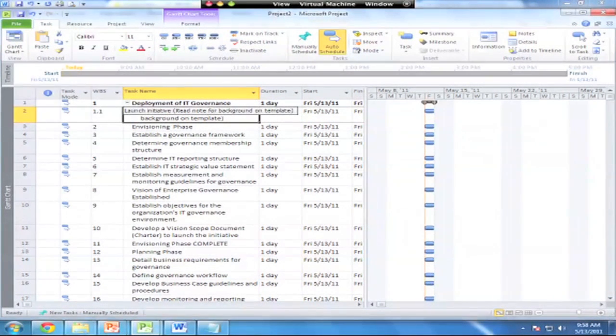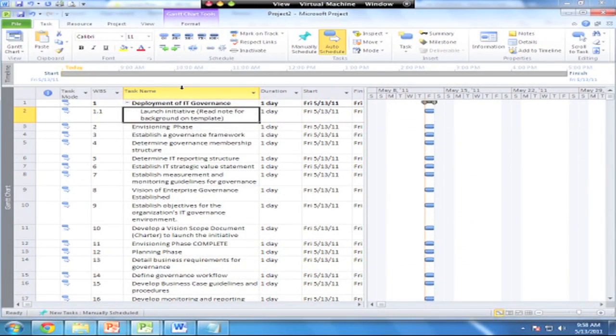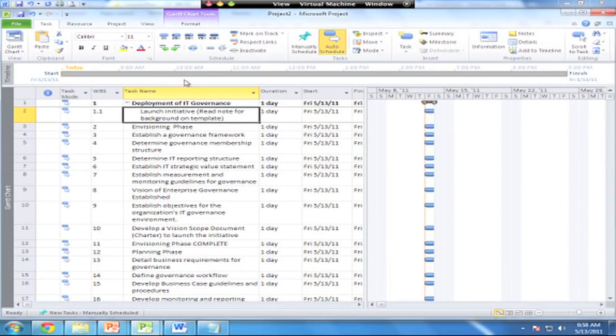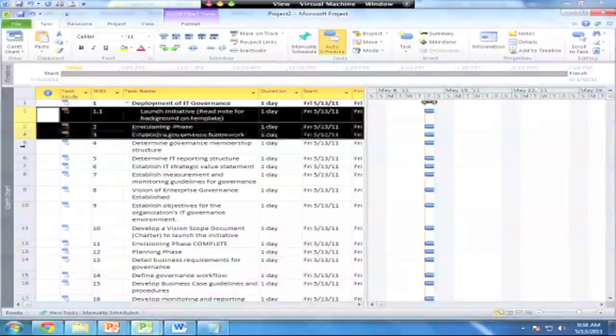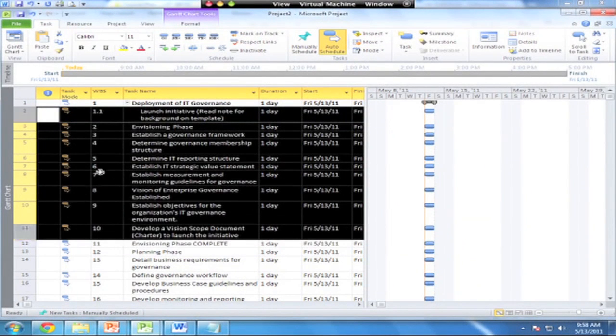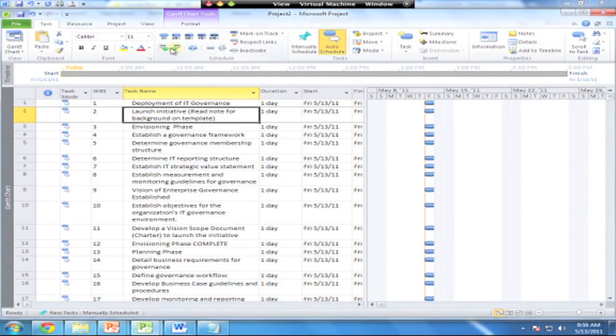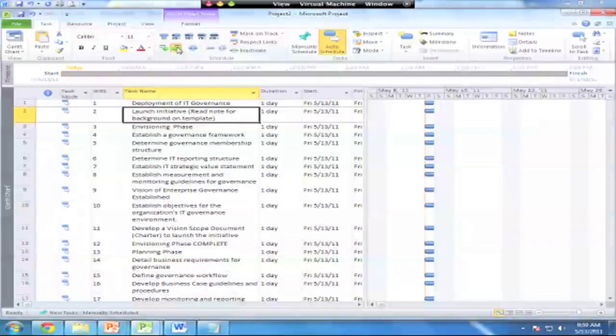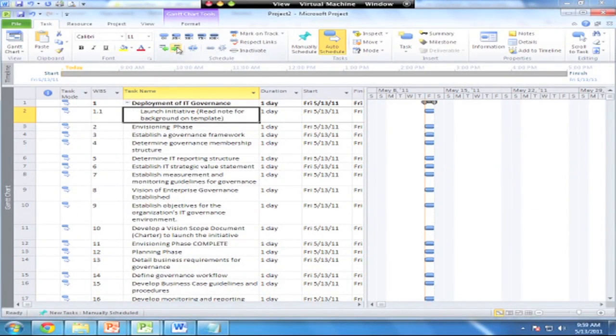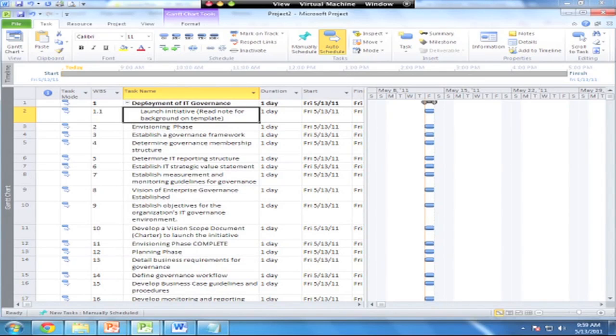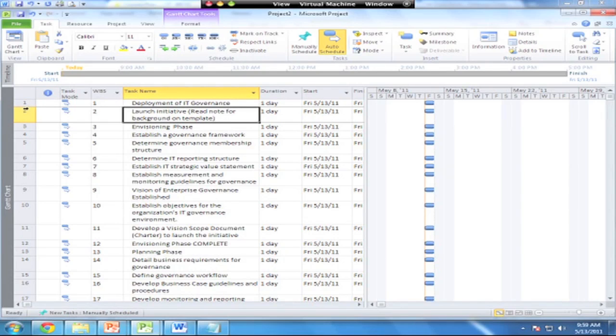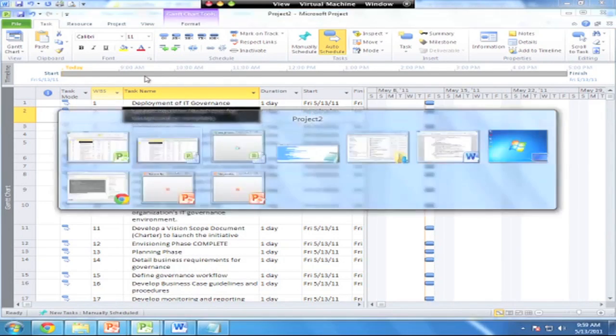If you're doing a written outline view of a WBS, this is how you'd indent these lines to show how they fit together. If I highlight all of these rows down below the first one, if I outdent that, it brings it back to the same level. If I indent it, it drops it down below. You'll notice it makes this top task a summary task for all the tasks down below it.